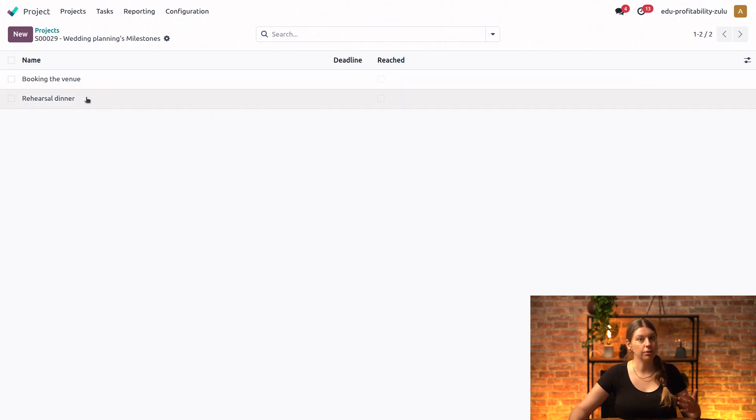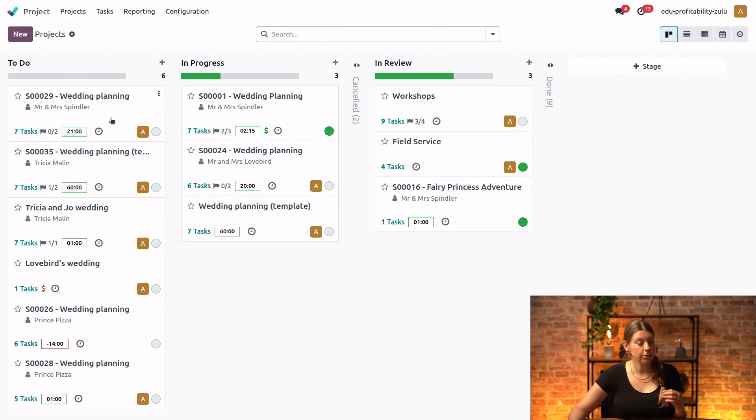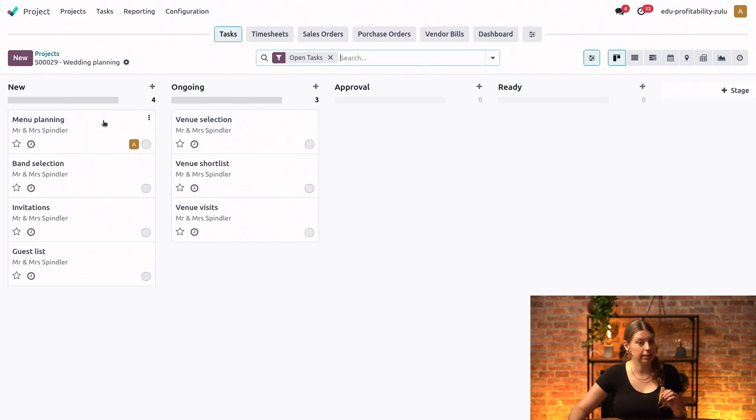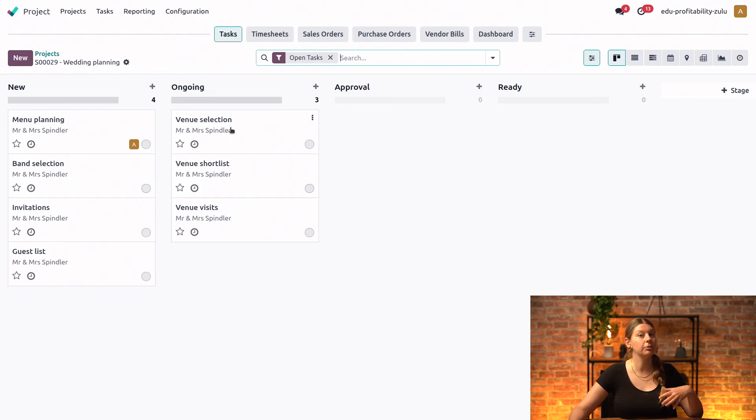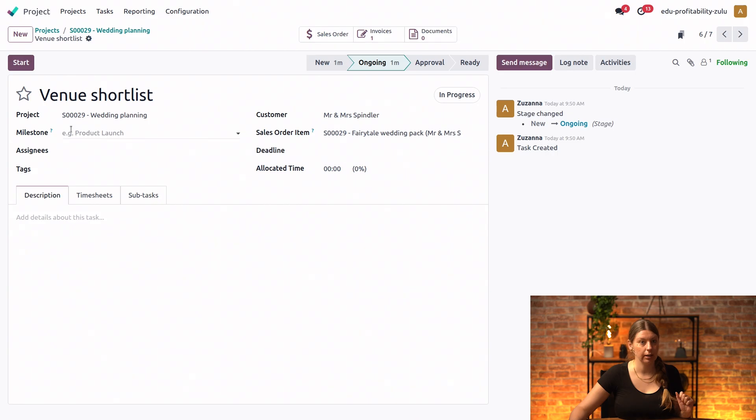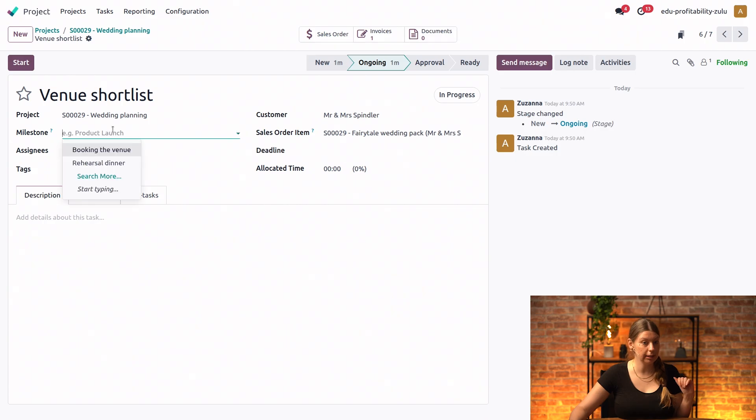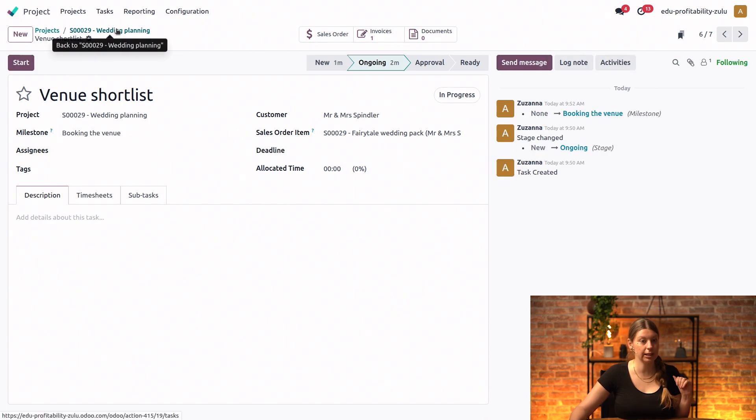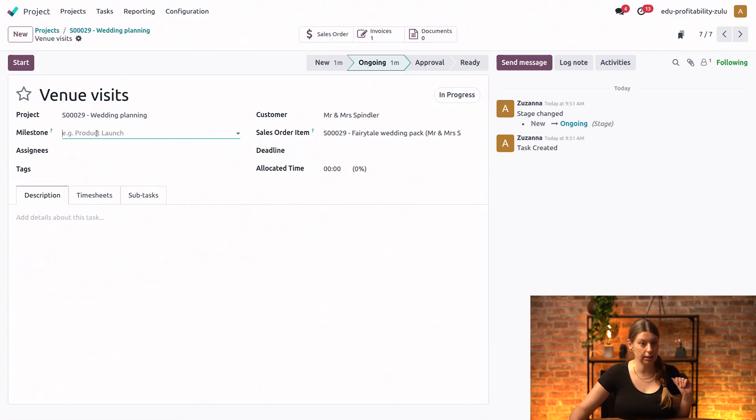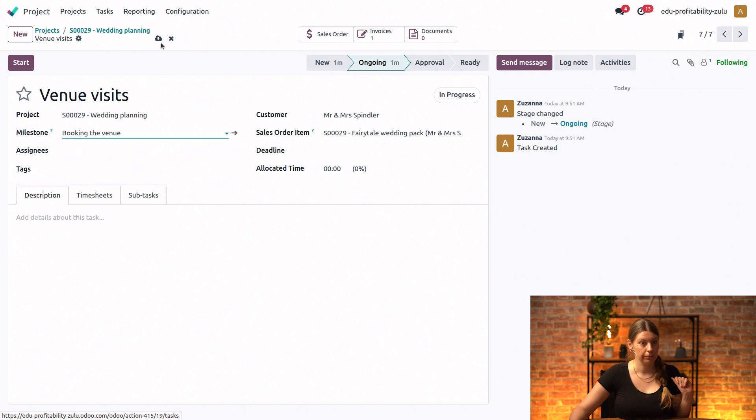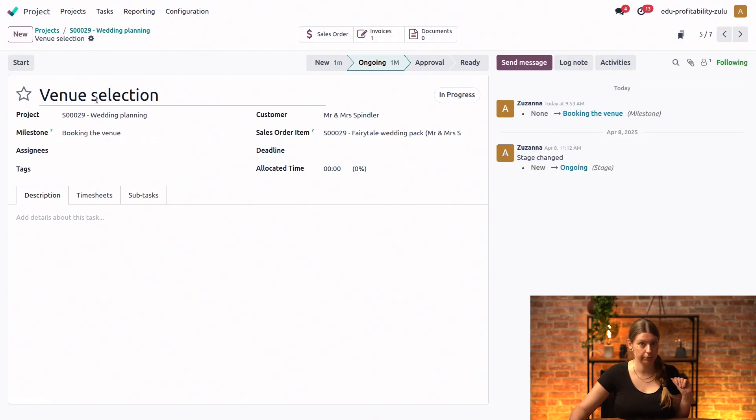So now that this is done, we're going to go ahead and link some tasks to our new milestones. Let's go into project, open the Kanban view. And for the venue booking, we have three tasks that absolutely need to be completed in order for the milestone to be reached. So it's the venue shortlist. I will open the task. And as you can see, I have the new milestone field right here, and I can select my booking the venue milestone. And I will do the same for the other two tasks. So the venue visits right here, I will add the milestone as well. And the last one is the venue selection. Again, I will link it to the milestone.